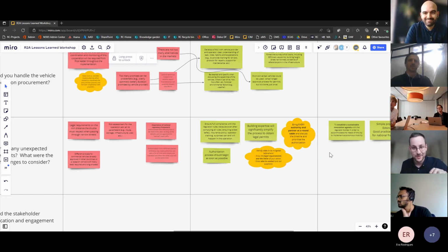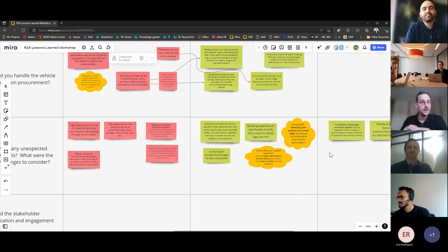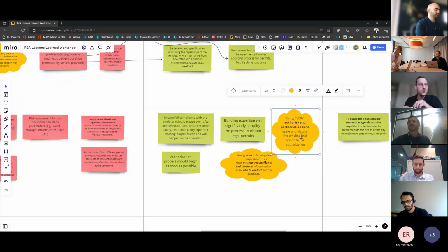Daniel, may I answer it, because I know it's my point? Absolutely, yes. Go ahead. Yes, and definitely put everybody on the table at the beginning, because you have to know who is playing which part and how much time they need. We had some problems with one authority to give us the authorization to drive on a specific national road, and it took more than half a year. If we had known beforehand, we would have asked them way earlier than the other authorities.